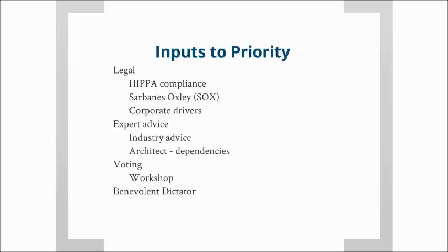risk is defined as risk because it is an unknown. There's something there that we don't know. And if we don't know what it is, we don't know how long it's going to take. We don't know what kind of resources are involved. We don't want to save that kind of stuff for the end. We want to get on it right away, because if it is going to impact requirements down the line, we need to know that. And if it's going to take a long time to work through it, we want to deal with it now and not at the end of the project.